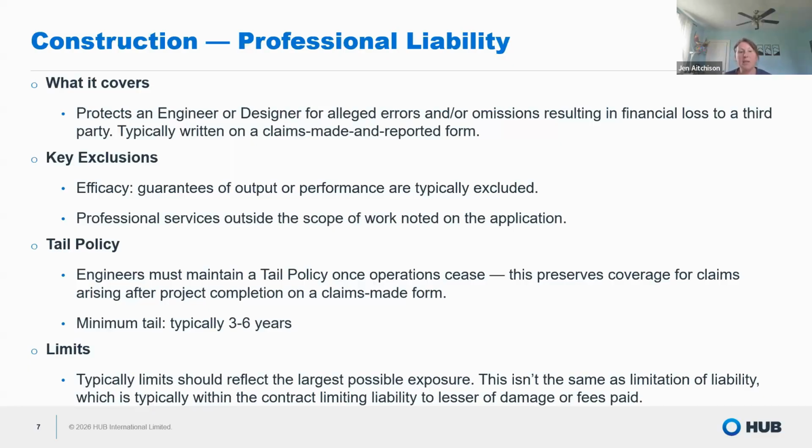And then when we're looking at limits, as I mentioned before, professional liability can be a really difficult thing to evaluate from an exposure perspective. Oftentimes in contract, if you're doing design work or you're in an engineering capacity, the limitation of liability is capped at the lesser of damages or fees paid to the engineer. And I can tell you that fees paid to an engineer for work done can be a couple $1,000s, but the exposure can be in the millions.